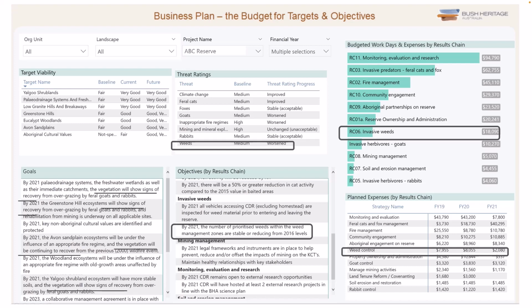If not, could we increase the level of investment by reallocating resources from other activities? If not, can we find additional resources? Or if not, should we extend the objective time frame, as we see here, to have a good chance of achieving the objective? And what would be the consequences of this extension?